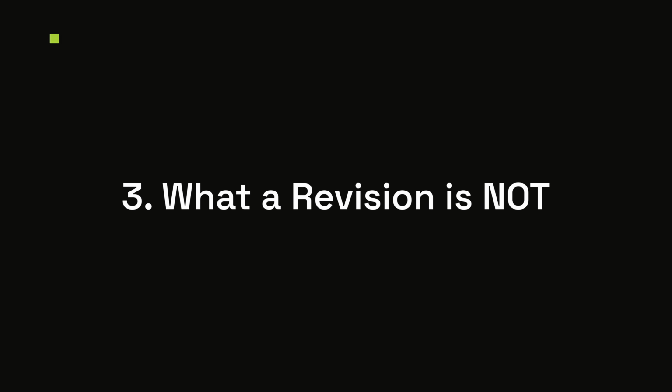Number 3, what a revision is not. A revision changes something within the agreed scope. Adjusting the lighting is a revision. A third product variant is a new job. Write one sentence that draws that line and reference the deliverables you listed in the proposal. This is the clause that kills scope creep, and scope creep is where my lost 24 days went.